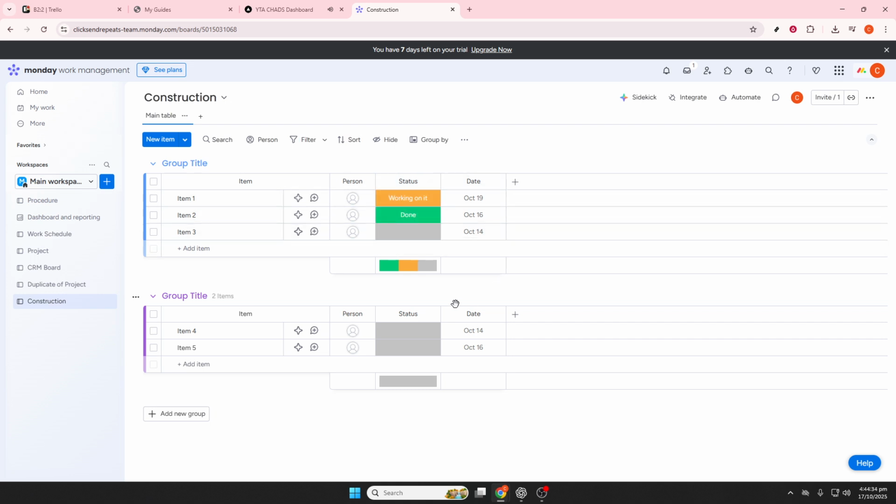Managing the budget and resources is vital, and Monday.com can help with that as well. Use formula columns to calculate costs versus the budget and track remaining amounts. For entering actual costs of labor or materials, number or currency columns can be utilized effectively. Integration with accounting tools or importing cost data is a breeze, further aiding in budget management.